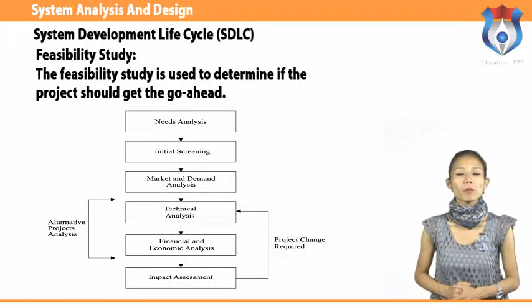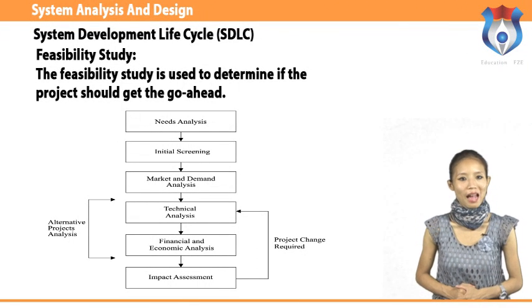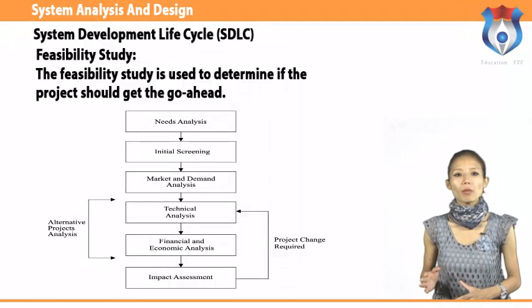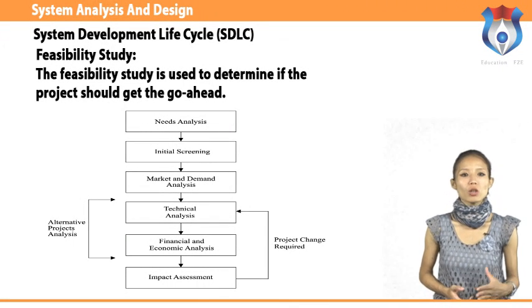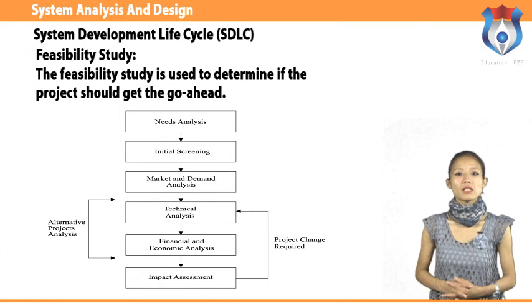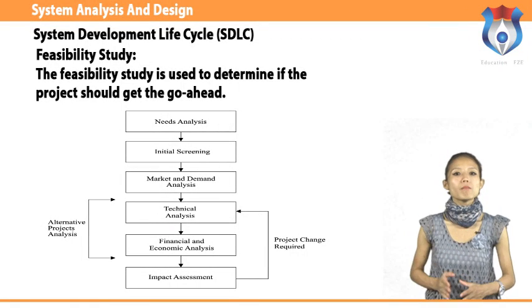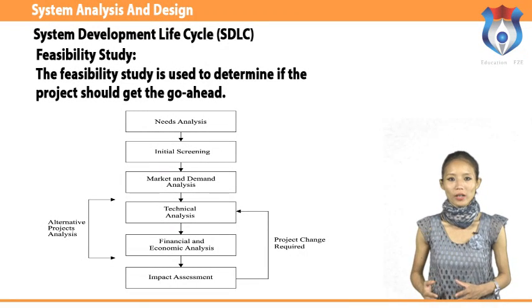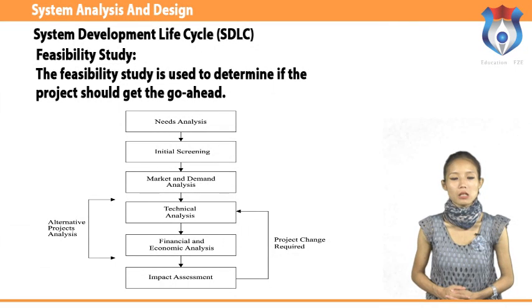The feasibility of a proposed system can be assessed in terms of four major categories as summarized. Organizational feasibility: the extent to which a proposed information system supports the objectives of the organization. The strategic plan for information systems determines the organizational feasibility of the system project. The information system must be taken as a subset of the whole organization. Economic feasibility: in this study, costs and returns are evaluated to know whether returns justify the investment in the system project.